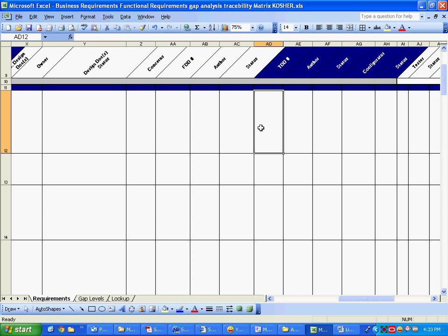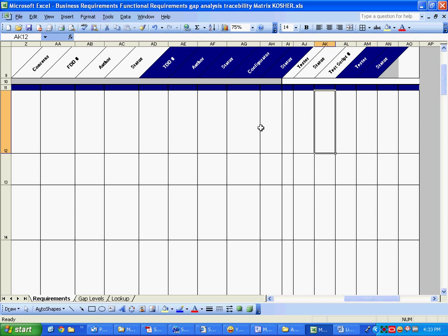So this is now evolving into a big traceability matrix. Your project may not use this complex a traceability matrix, but you will definitely be using it till this point, till status. Testing can also be tracked using this, whether this requirement is getting tested or not. The tester can add to the columns we have made, on the same sheet. Typically they'll be using something called SharePoint, where the BA checks in the document, then others can check out and fill in their inputs, and then check in again. That way there won't be multiple copies of the same document; everyone has access.